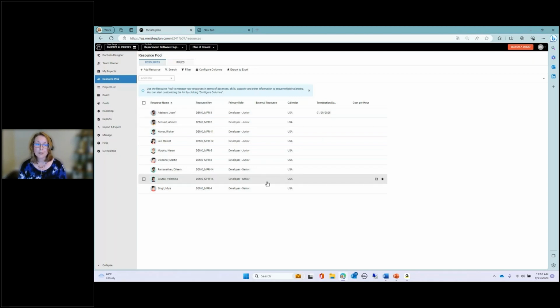Now, one thing to keep in mind: if you're using these financial features that I will show you for financial forecasting, what you're actually going to spend, then don't put costs on internal labor rates. If, instead, you really want to use all the features for more of that project costing, then internal labor rates can be added for that reason.